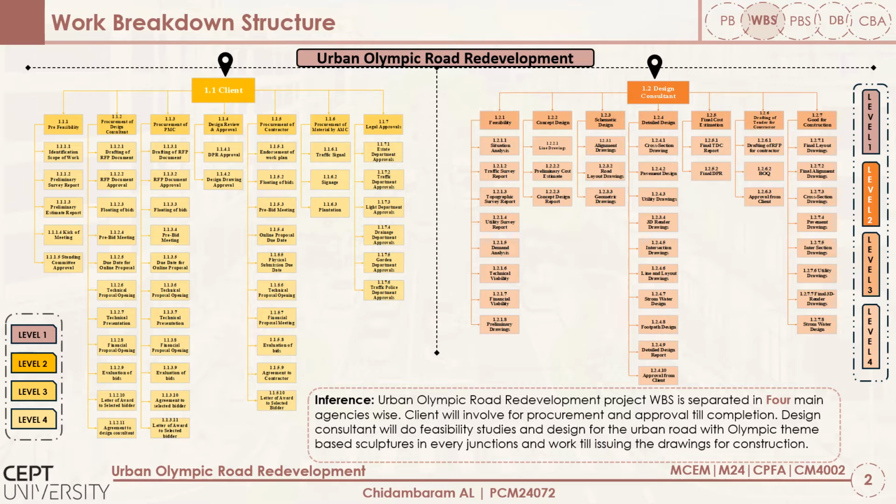Client responsibility is to conduct pre-feasibility studies and legal approvals to select the consultancies and contractors. The main materials procured by the client are traffic signals, plantations, and signages.